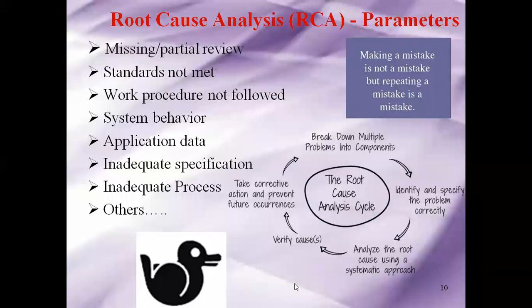The root cause analysis is to break down multiple problems into components. You identify and specify the problem correctly, because these are all phases of the root cause cycle. Then analyze the root cause using a systematic approach, and then verify the causes and take corrective action. How you do it depends upon your organization, but please remember these are the phases which go into a root cause analysis.